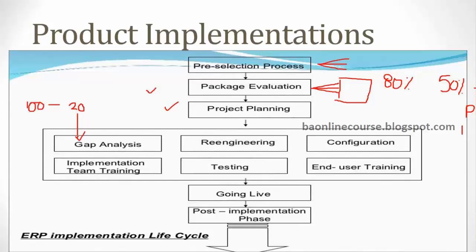So you'll figure out, how should I implement these 20? What all customization I need to do? Okay. So once you understand how to implement those 20 changes, we would say it is customization. That's a more widely used word. So you would customize or do the development for those 20 features, right? So basically you're making sure that all your 100 features are met, right? 80 of them are already there in the product, and 20 you have developed specifically for this implementation.